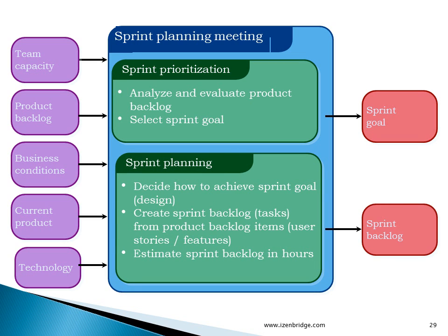And to represent what this sprint is all about, we should write a small sprint goal which will guide us while doing the work during 30 days, and it gets represented in the format of a sprint goal. In the second section of a sprint planning meeting, the team breaks the selected product backlog into manageable tasks. They are engineering tasks, and the team also does an estimation in the form of ideal hours for those tasks.